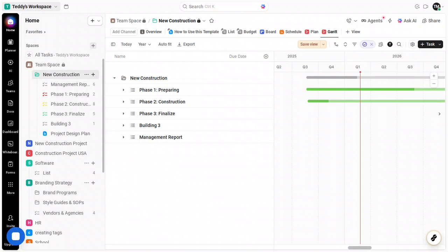To change how much of the schedule you can see at once, adjust the timeline scale. Select a preset like 4 weeks to view a clean monthly spread that's perfect for short sprints and quick planning cycles. One of the best things about a Gantt chart is how flexible it is. You're never locked into a view that doesn't match your needs. Drag bars to extend timelines. Move tasks forward or back as plans evolve, and update task completion right from this screen.